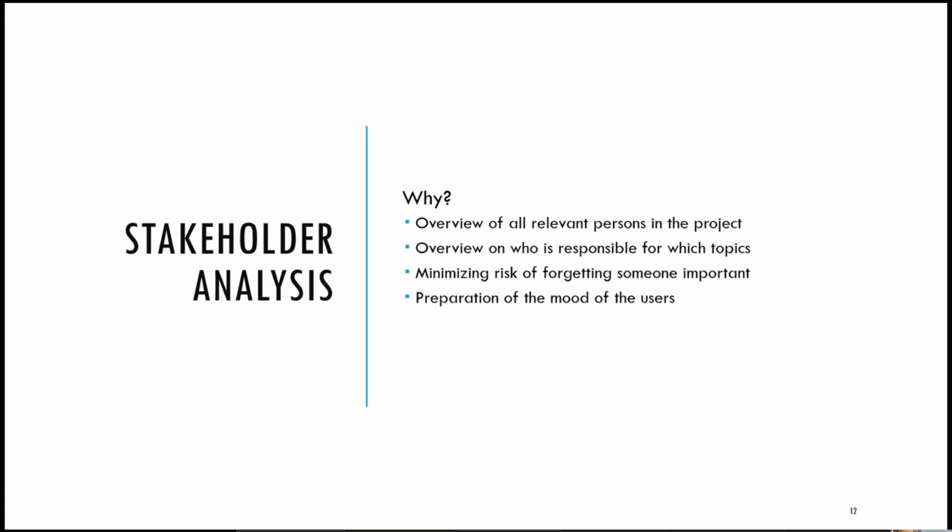And overall, I identified three main reasons why I think stakeholder analysis is so important. First, you get an overview of the persons and the topics. When somebody new joins the project, it's an easy way of providing contact data and context of persons, because the new person doesn't know anyone yet. Second, forgetting somebody is always unpleasant. Forgetting a whole department because you never sat down and thought about who could be important can mean a delay or stop of a project.